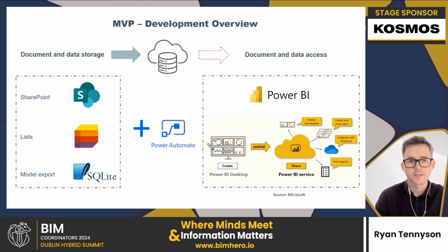This slide illustrates the relationship and structure of how we would approach this. It allowed us to have a structured approach, but also it was relational, yet flexible, and it would allow clients and owners to keep their information and documentation up to date during the operational phase. So on the left side, we've got SharePoint as the directory where all the documents and data would go. We had Microsoft Lists, which would then start to pull some of that data out of the documentation within SharePoint and keep that in a structured order.